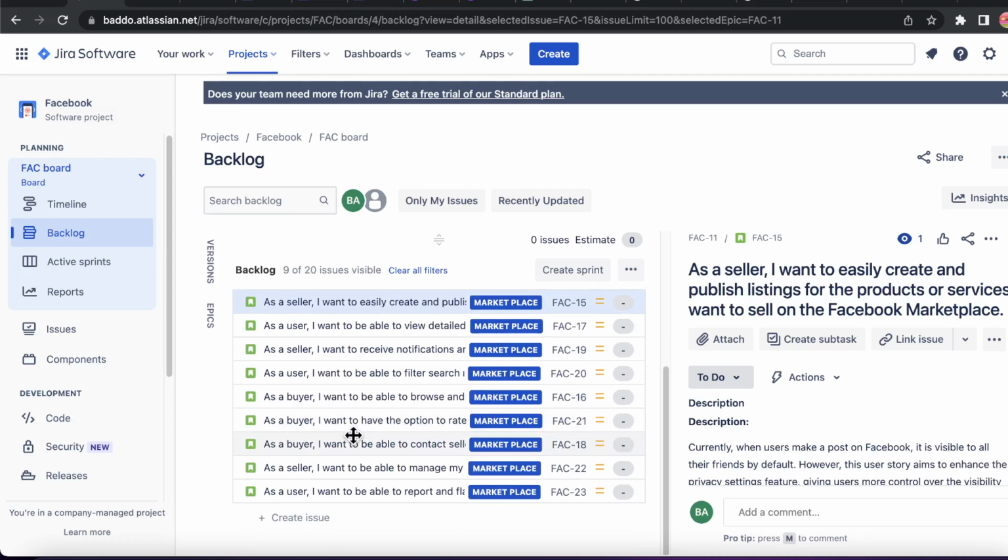What that means is that these are raw user stories that have been entered. Before developers can work on them, they need some more details about the user story. And then they can't just pick any of them and start working on them. They would also have to put them in order of preference according to the product owner and stakeholders. So we are doing backlog refinement.